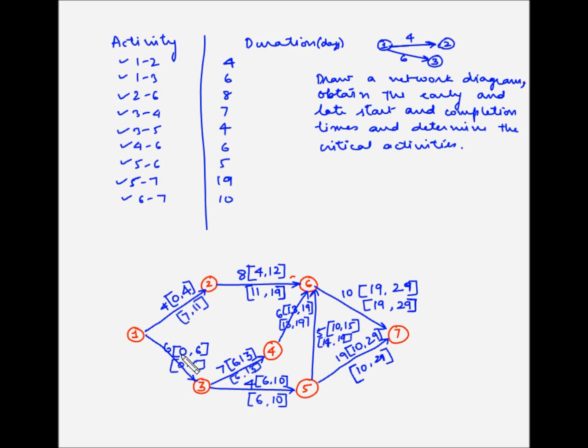Another way is to determine if the earliest start and latest start is the same, along with the earliest finish and latest finish being the same. So if both the sets of duration is the same for an activity, it may fall on the critical path. So let us determine these critical activities and then see if they are on the critical path.